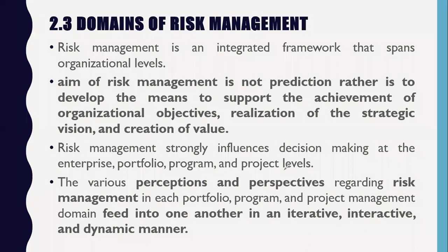So we have strengthened our decision making by providing a clear guideline that whenever, on our construction site, the rain starts, what will be our corrective action, how we will continue our operations, what are the standards. So it influenced the decision making, right? So it strongly influenced the decision making at the enterprise level. It means overall portfolio, program, and project level.